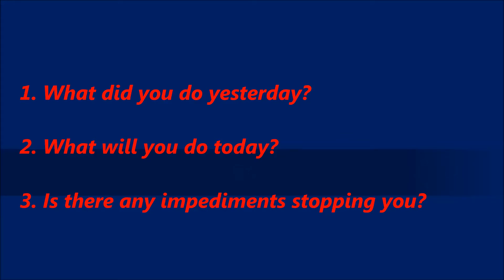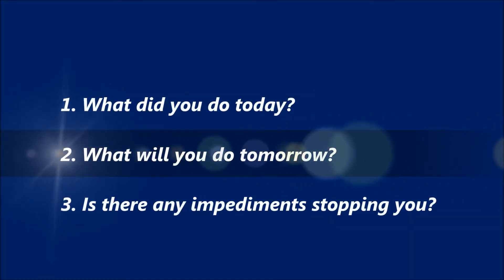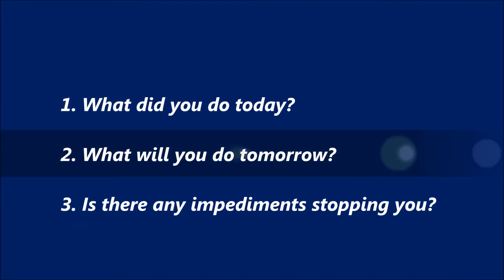These questions depend on your scheduled daily scrum meeting time. If your meeting is in the morning, the above questions apply. If your meeting is scheduled in the evening, the questions are: One: What did you do today? Two: What will you do tomorrow? Three: Are there any impediments stopping you? Every team member should participate in this meeting and provide a status update. The scrum master will discuss with individuals and schedule meetings at a convenient time.